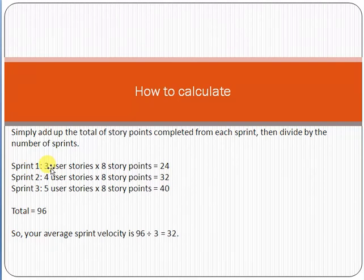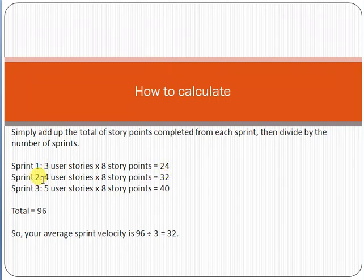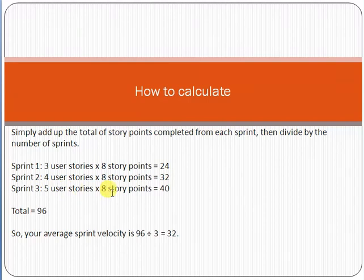For example: in Sprint 1, the Scrum team completed three user stories with eight points each, giving 24 story points. In Sprint 2, four user stories were completed with eight points each, giving 32 story points. In Sprint 3, five user stories were completed with eight points each, giving 40 story points.